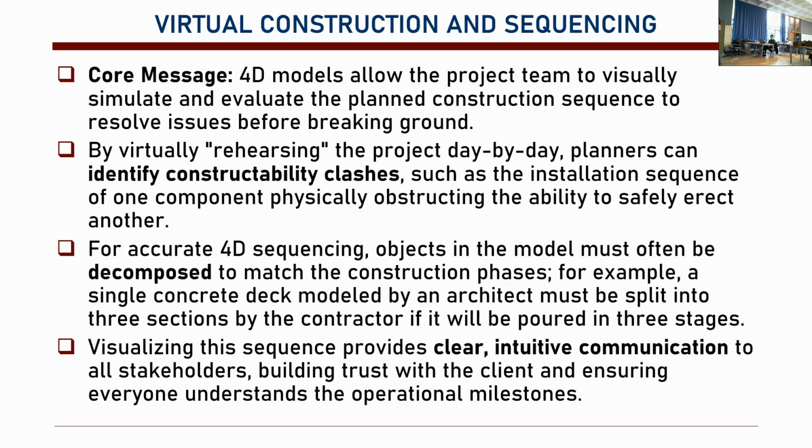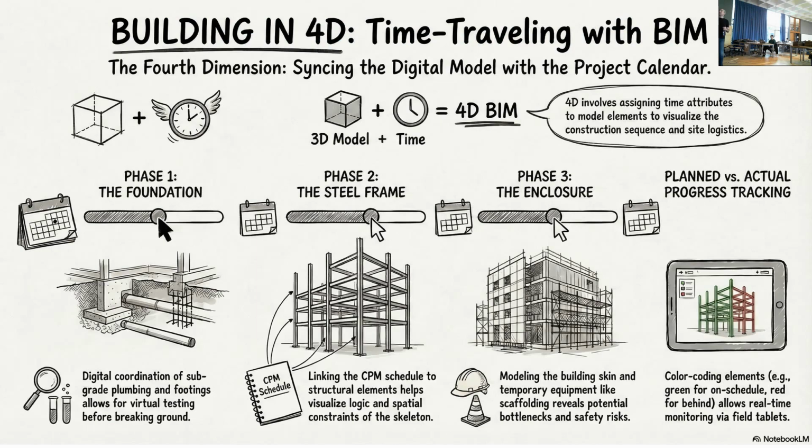And we basically decompose objects for that. For instance, if you have a single concrete deck which is very large, you cannot pour it in one day. If it's going to be poured in several pieces, then you break it down and split it into sections. Basically, it gives us a clear, intuitive communication between people. With the time frame, you agree on things, and the client and different contractors can easily see.